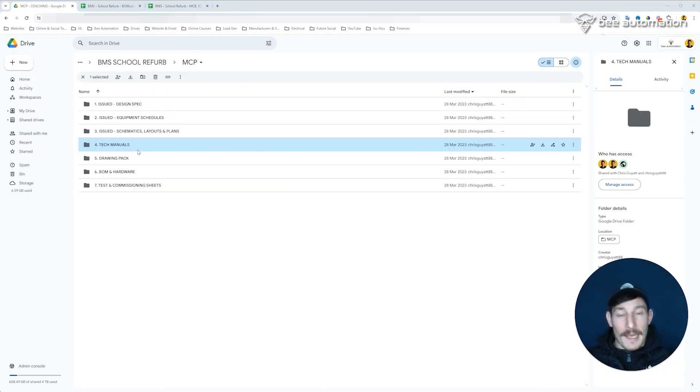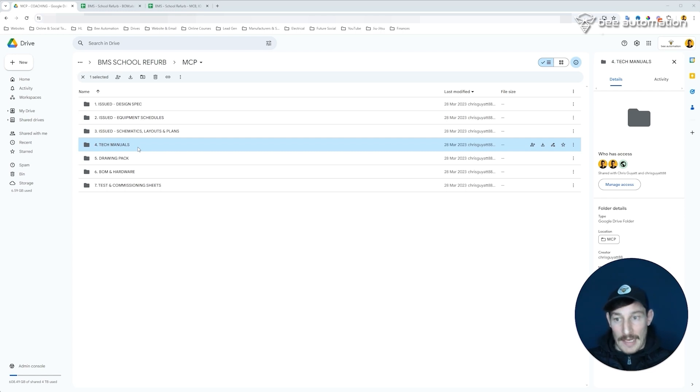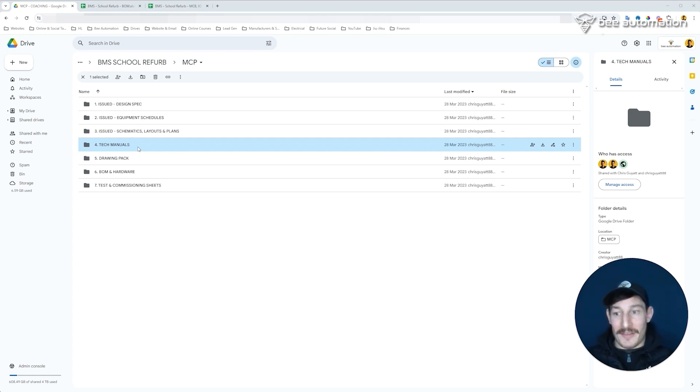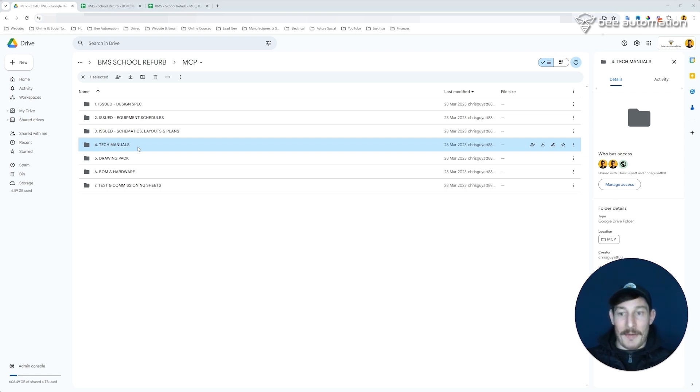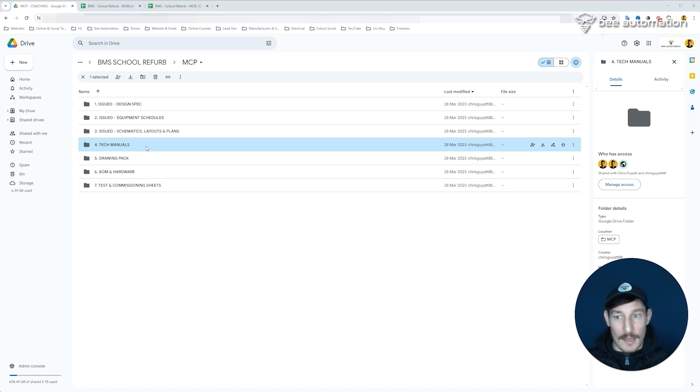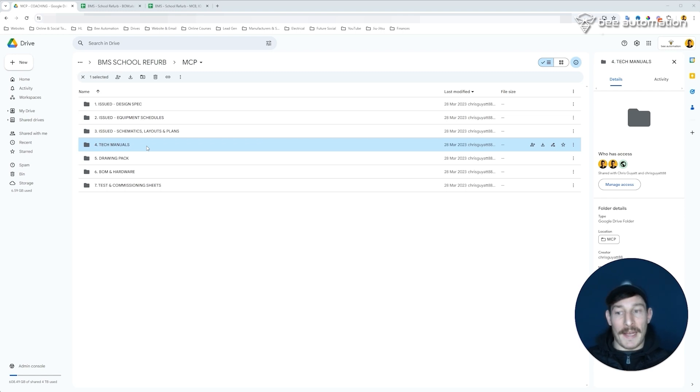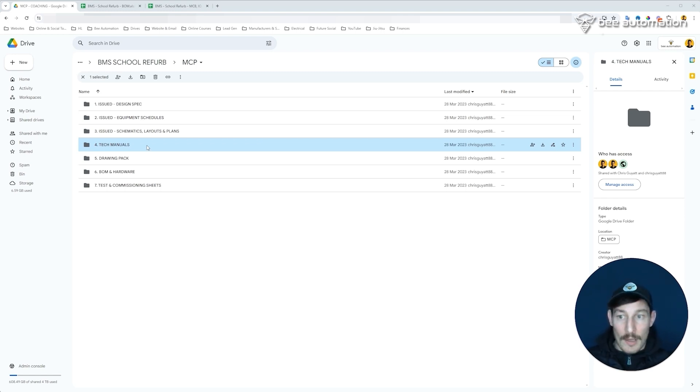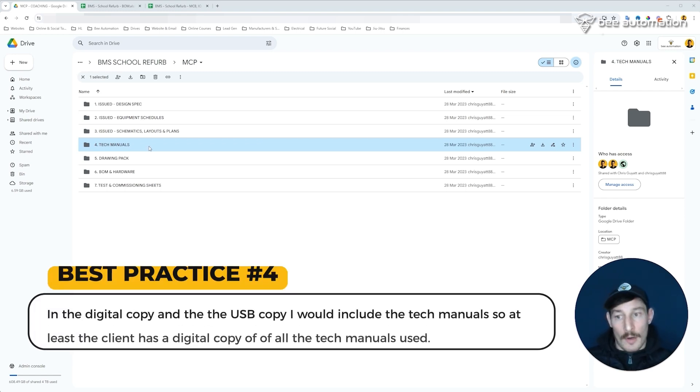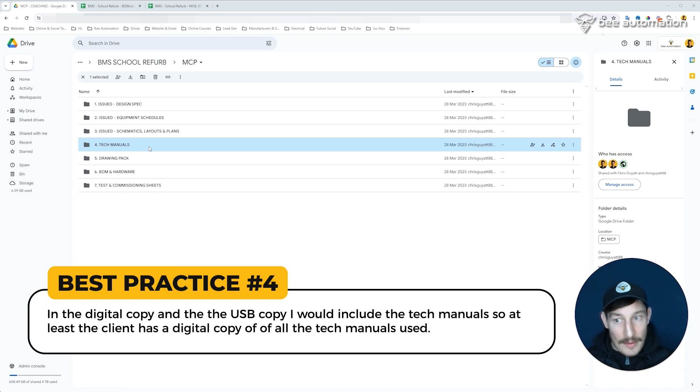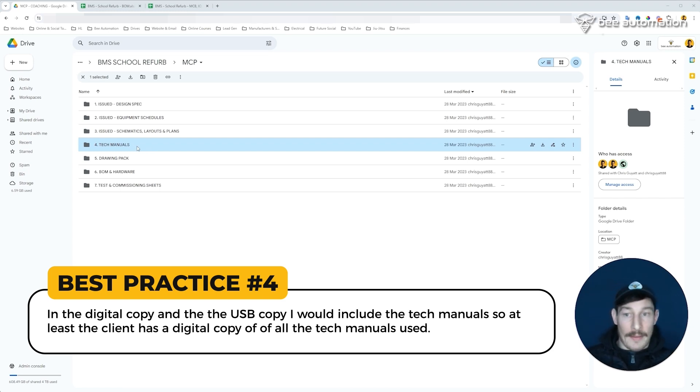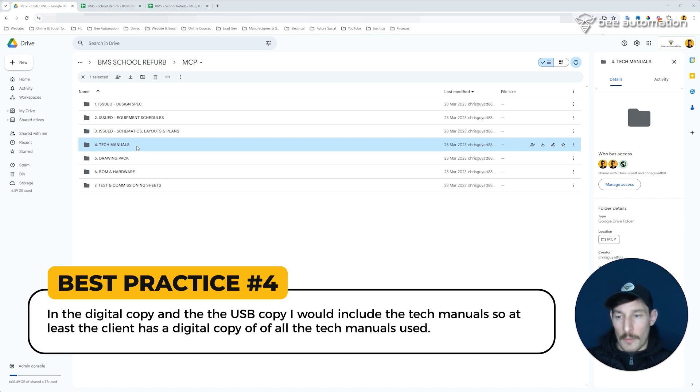Now tech manuals. I wouldn't necessarily print all of these tech manuals out and put them in the physical site pack, because as you can imagine there can be lots of tech manuals and it will just get out of hand. Most likely not all tech manuals are going to be referenced anyway, or tech manuals are so big you only tend to have to use or need one or two pages out of a tech manual anyway. So I wouldn't be printing these tech manuals out, but in the digital copy and the USB copy I would put this folder in there, so at least the client has a digital copy of all the tech manuals used.